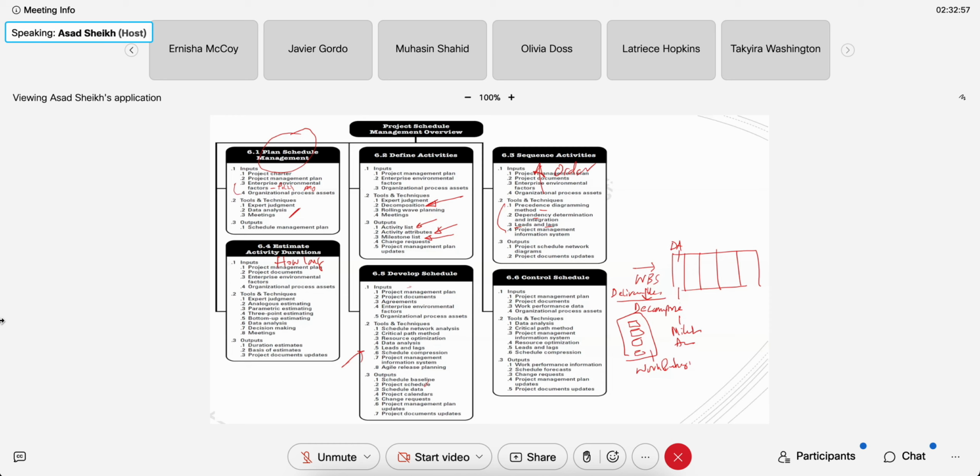The other team gave me the deliverables and decomposed it barely, but didn't tell me that. And then they started to work on it. And then they started to fall behind. And I asked them, what's going on here? The second team, the B. And the reason that was happening was because when they decomposed their deliverable into respective tasks, they had to go to 2 additional people to do those tasks. So here's a lead. I thought he's going to work on everything.